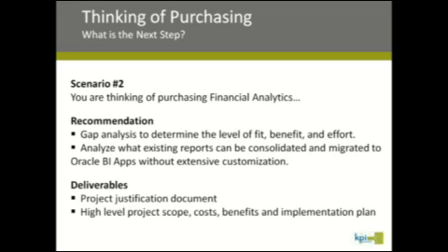Analyze what existing reports can be consolidated and migrated to Oracle BI apps without extensive customization, figure out what the ROI is going to be, and the deliverable, if you get KPI to do it, we typically will work with you to do a project justification document, which will have high-level project scope, cost, benefits, and an implementation plan.